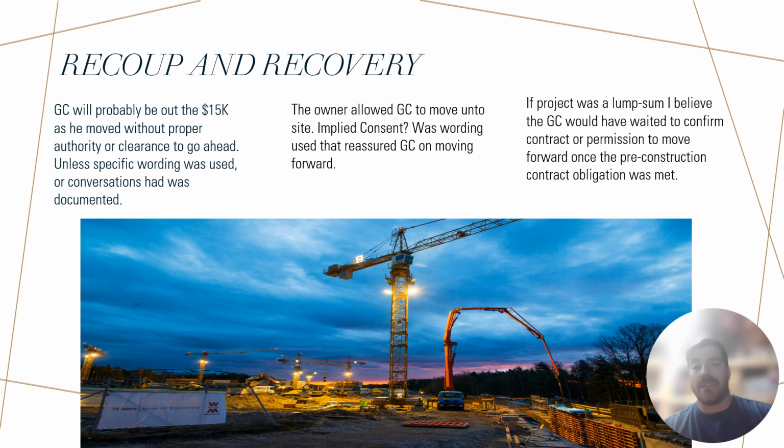And then I want to touch on if this project was lump sum, I believe the GC would have waited to confirm contract or permission to move forward once the pre-construction contractual obligations were met, right? Because he's not getting paid to move this stuff, right? So right now he believes in his mind, based upon the patterns and the implied consent that has been shown by the owner, that he was good to go. He met his pre-construction contractual obligations, met with the city, was there for all the design, all the meetings. So he is good to go onto the site, right?